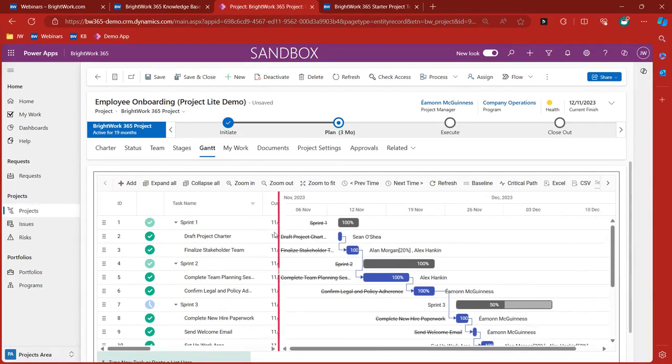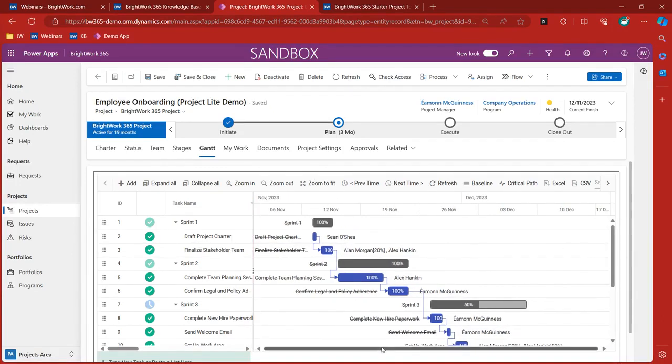And then you can see we have sort of a horizontal calendar of what's going on with all the tasks, and you can have dependencies between them. So for example, if this task over here were to get extended in terms of time, then the start date of the task below it would get pushed out automatically. So that's what these arrows are about. You could have other more complex associations between tasks, but the most popular, I think, would be finish to start. So when the finish date of this is calculated, that'll determine the start date of the task that's underneath.